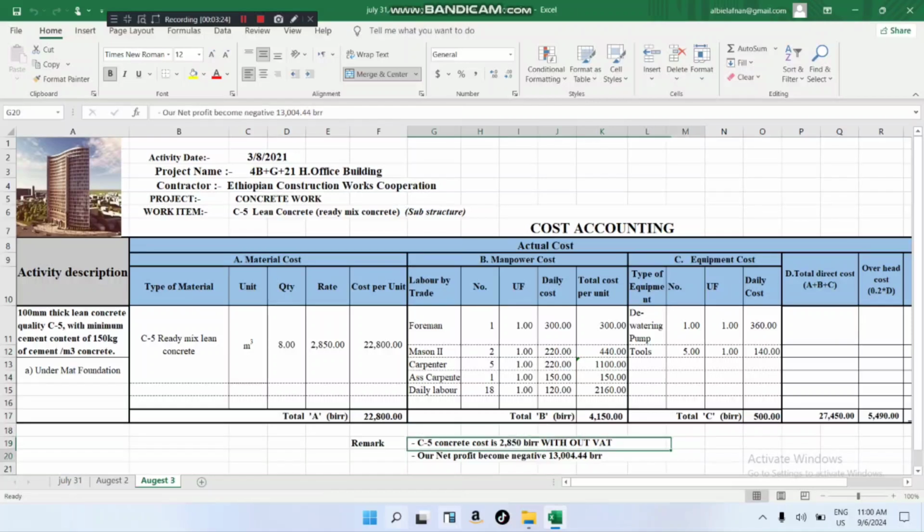This cost breakdown is easy, but the difficult thing is the material cost. You have to ask for the price in the market at present, and you also have to predict how much it will increase, maybe you will not start the project early, maybe after you start it will increase, and this will be covered by the percent of the overhead or profit. When you add, you have to add a logical price to cover any change in the price.